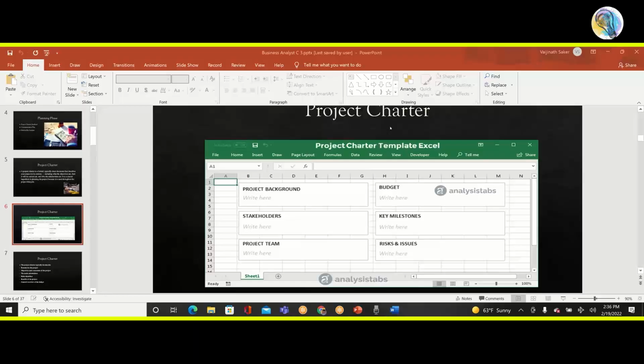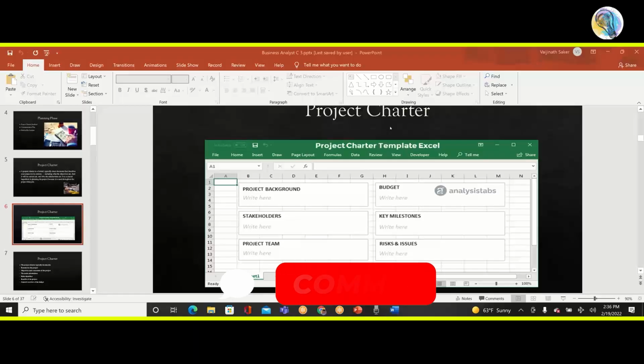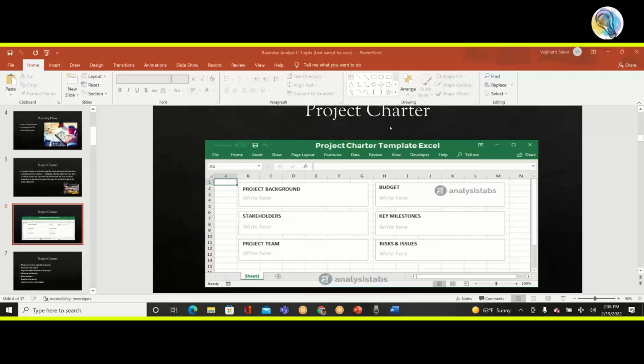So, say for example, there is a dependency with an external team. Say for example, we don't have any Informatica developers, there is migration work. So, we are actually depending on another team. And that external team has a history of not delivering the dependencies on time. That is most definitely a risk or an issue. So these are all risks. Anything and everything that's outside our control can be categorized as a risk or an issue.